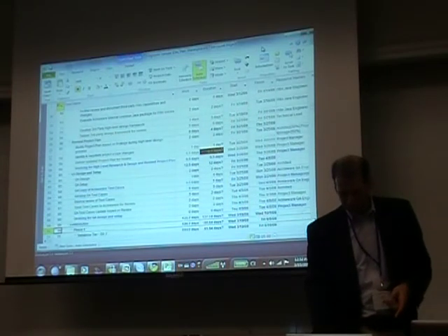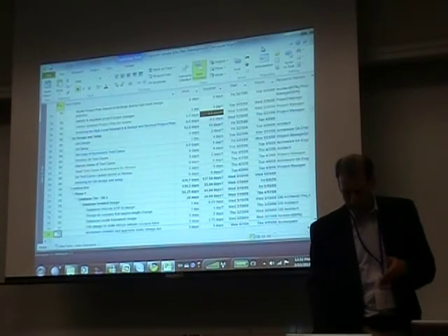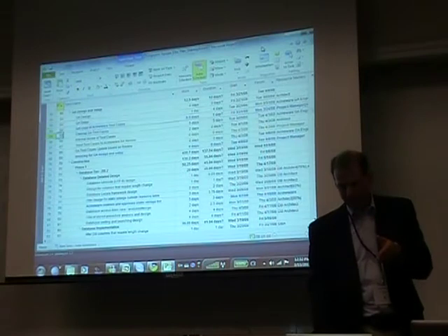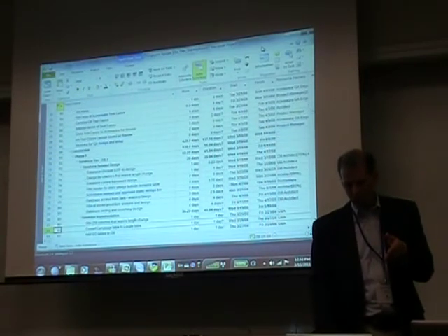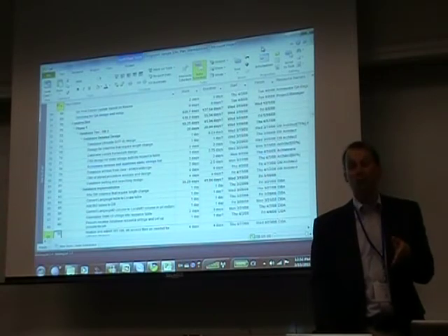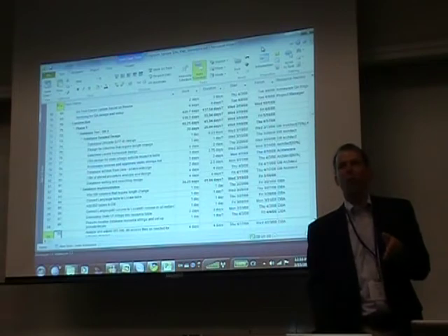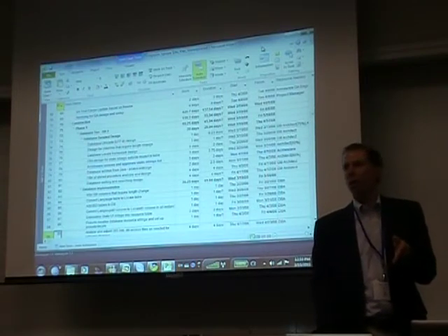So again, we've delivered all the planning, at this point I kind of jumped ahead, you've come up with a QA plan, now you go into construction. You can see we're getting the database out of the way pretty fast, because the database tends to spread across the whole application. You kind of want to get that stuff going pretty quickly.